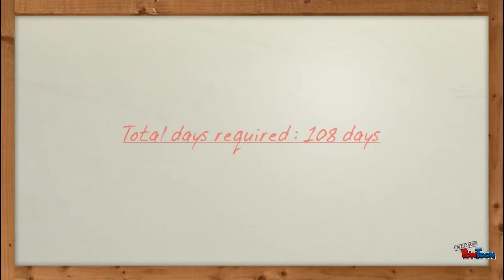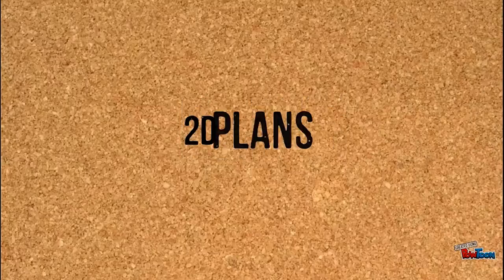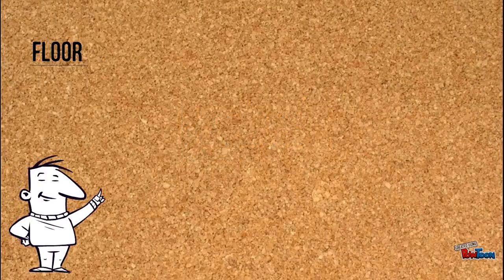to the client. As a whole, it is predicted the project will be completed within 108 days, with 64 days for pre-construction, 50 days for construction, and a final 8 days for the completion stage. So here comes our designed iRoom.